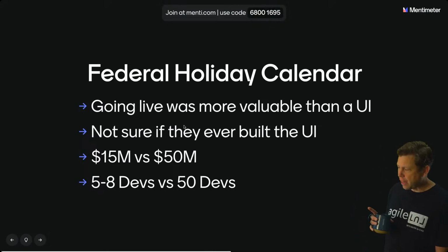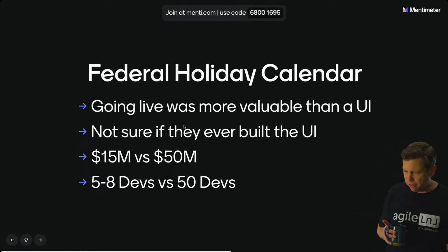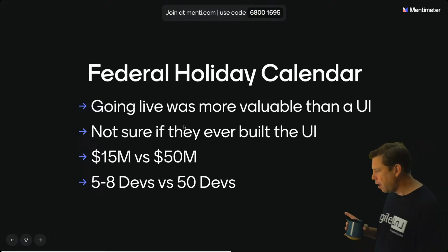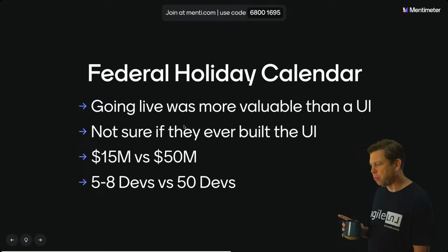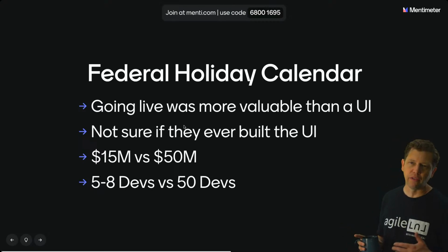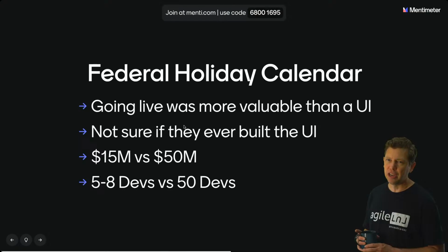And while I liked the idea of this just-in-time delivery like he was describing, I felt a little bit uncomfortable with the idea of saying it was done when we knew it wasn't. And what we ended up doing is we were able to pull a list of how often these reports are being viewed. And so the ones that were being viewed regularly, we built all those. The other ones we said, we'd be happy to build these for you if you ever need them again. But since you haven't used them in the last 2 years, there's a pretty good chance you're not going to need them in the next 2 years.